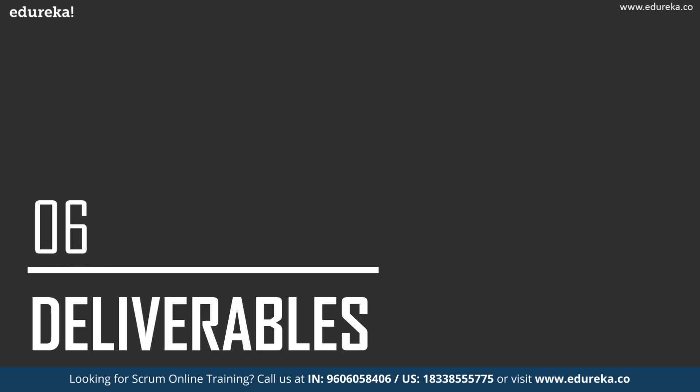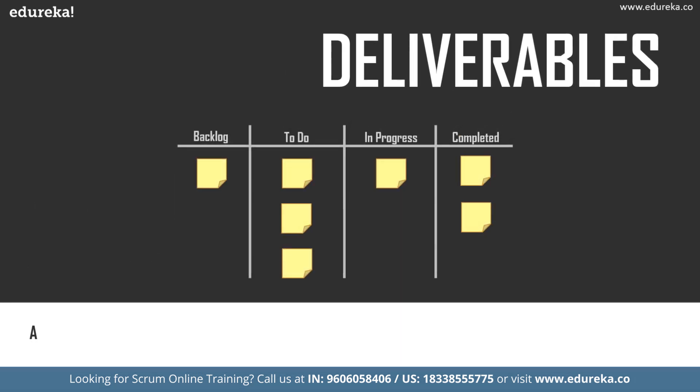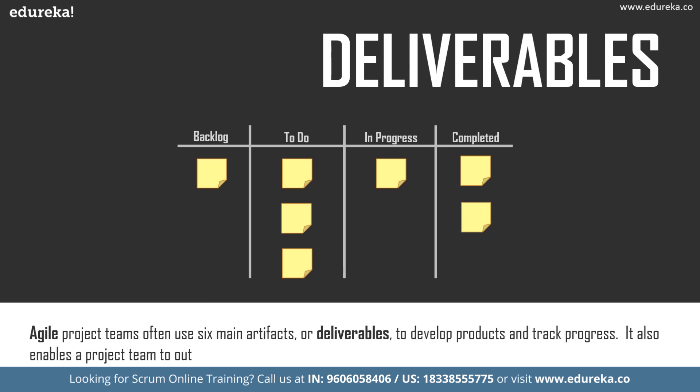Now let's talk about deliverables. Agile project teams typically use six main artifacts or deliverables to develop products and track progress, also enabling a general timeframe for when requirements will be developed and released. Created during the sprint planning meeting, the sprint goal is the aim for the sprint. It can be met through implementation of product backlogs, provides guidance to the development team on why the increment is built, and gives the sprint flexibility regarding the functionality implemented.